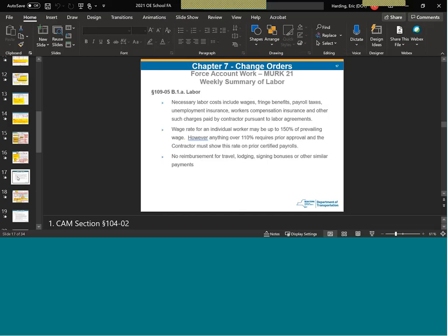But basically the answer is that it's true that the cash fringes don't get included in the labor subtotal, so you're going to have to enter it twice, in the sense of putting in a regular fringe rate plus the cash fringe total on the MERC 21s, 21-1s, 21-2, and so forth. Right. So the cash fringes are just a portion of that regular and premium fringe rate that is calculated in the labor subtotal. Correct. I hope that clears that up.